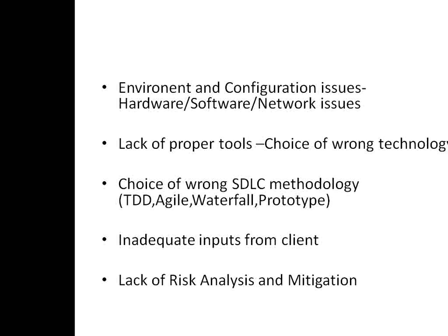What can each risk do to a client's business? How much impact can they have, the impact analysis. We don't do all this nowadays. It's very bad. See, there can be a risk which may even destroy the business of the client. It can lead to, say, 80% loss of revenues. So invest say 10 to 15% of your time in doing risk analysis and mitigation. It's very important, especially for a large project which has millions of dollars invested.